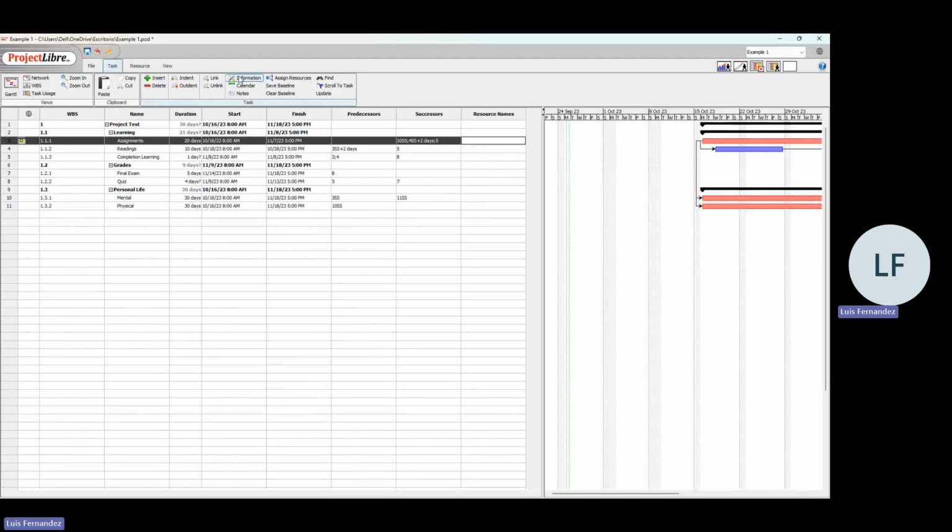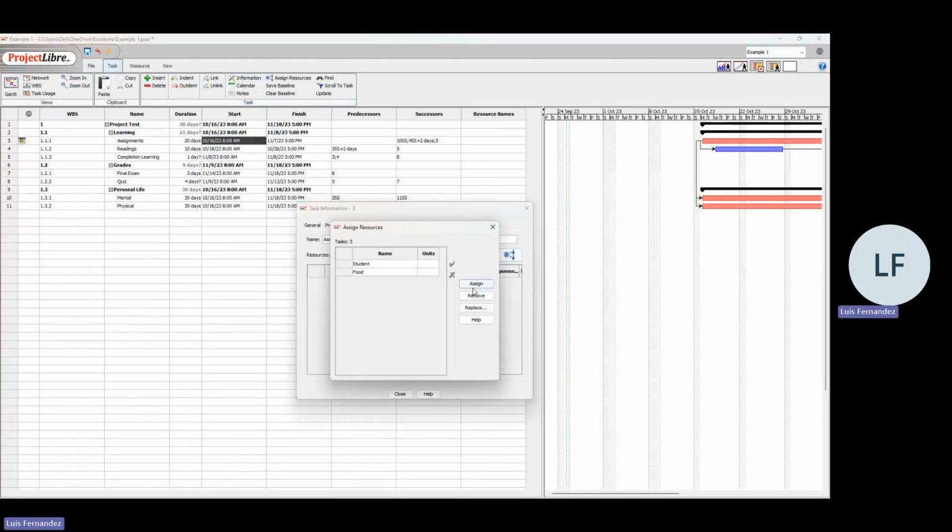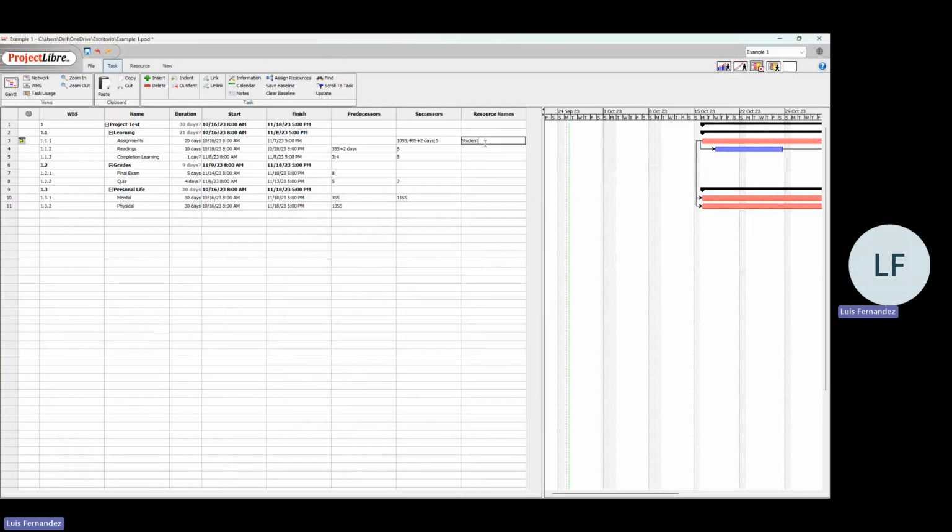So select the activity, go to information, double click, go to resources, and select the resource for the activity. Also, if you know the code, you can copy and paste it. We are not using the resource for the milestone because the milestone is only a flag. Then it notifies us that everything is ready. All right. Now I have saved my resource, and you can ask me, so what is next, Professor?